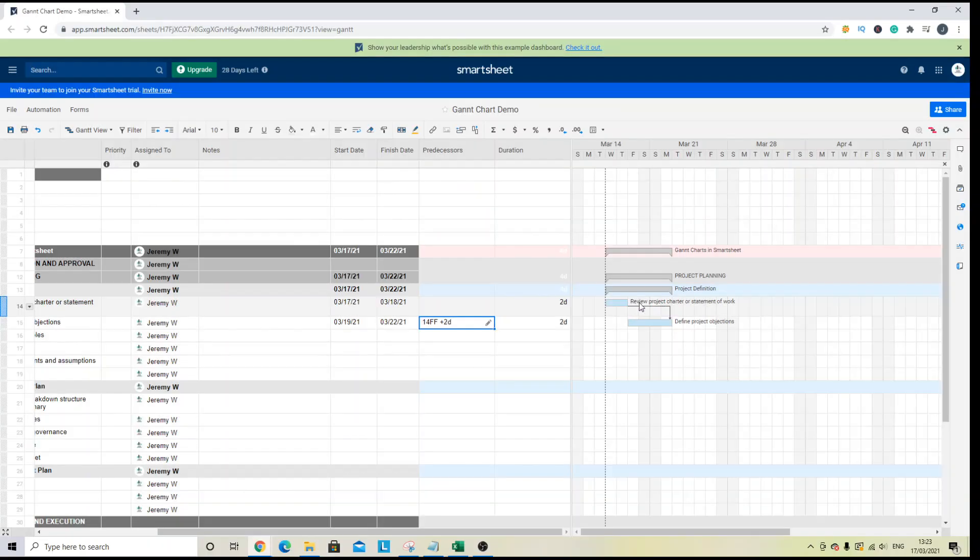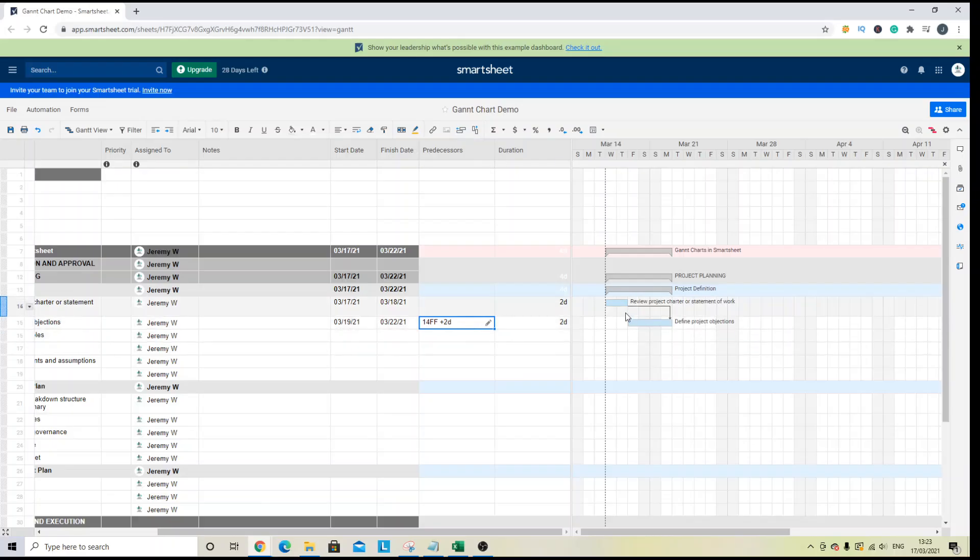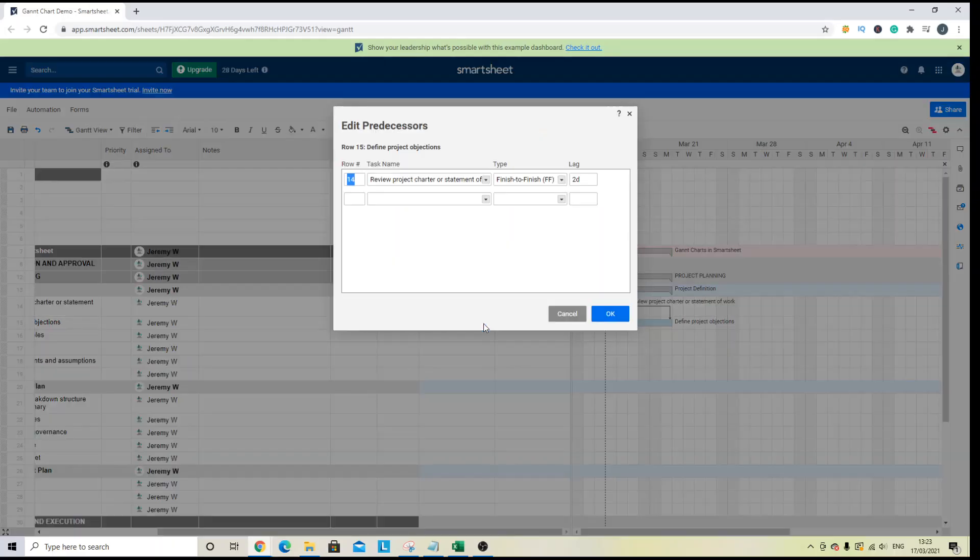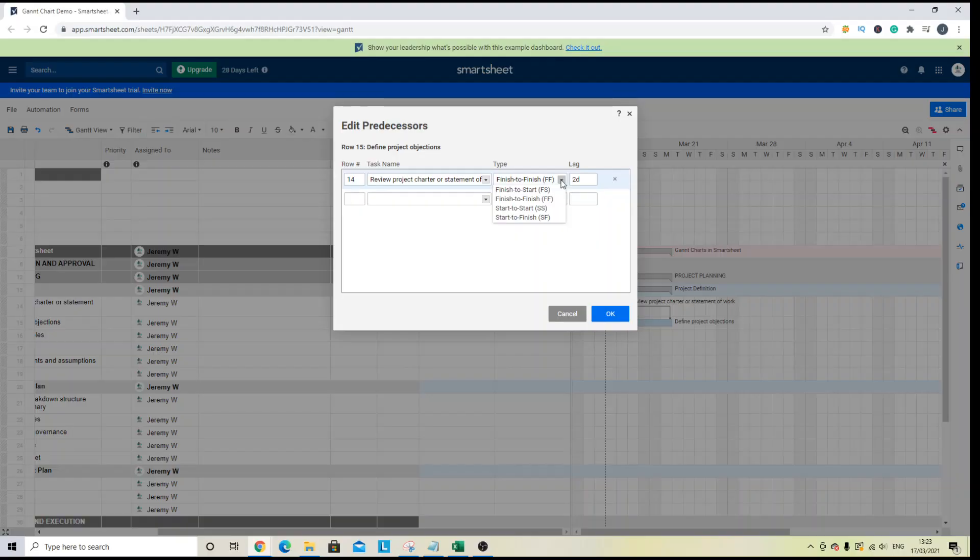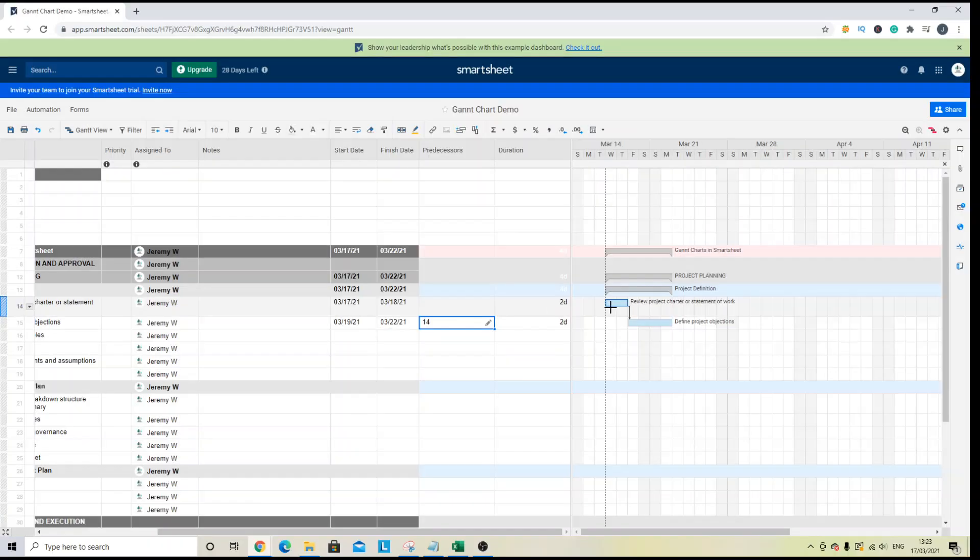Now, you will see that this has changed the dependency type and the predecessor column has updated accordingly. I'm actually going to change that back because for this particular program, we want a finish to finish. And we don't want a lag, so I'm going to take that out as well. And you can see it's updated here.